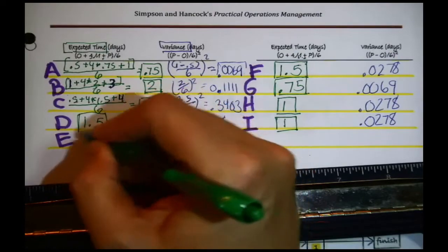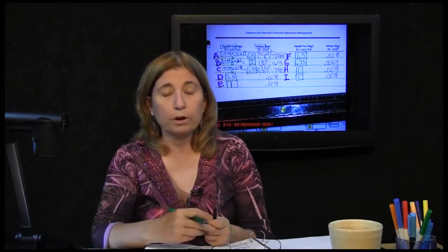Now, what did we do all that scratch work for? This is the first phase of a PERT analysis. You've gathered these 3 time estimates, and you crunch the numbers to create for each task an expected time. This is what you're going to plan on, and a variance. What's the variance for? Hang on to that thought. We really aren't going to use that information until later in the analysis. It was just handy to do it right now.